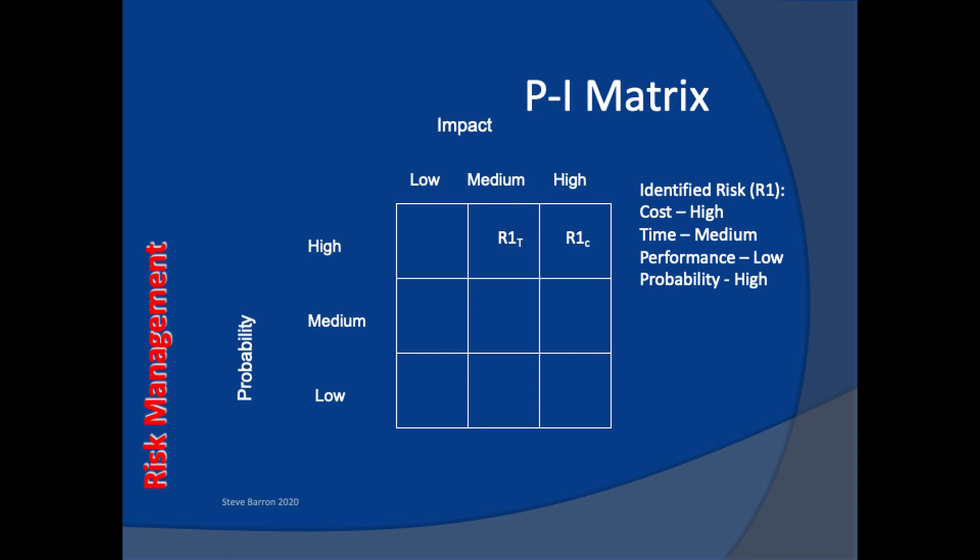The risk for time is rated as medium, so it sits in the cell for medium impact and still on the top row for high probability. For a project lasting a year, a high impact risk would introduce delays of about a month or more. A medium risk would delay the project by weeks, and a low time impact delay would be days.